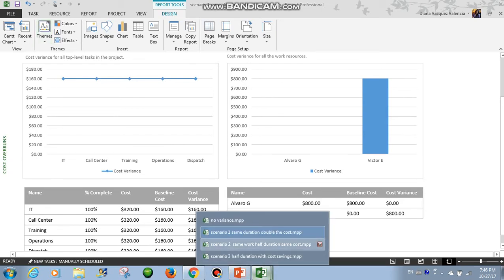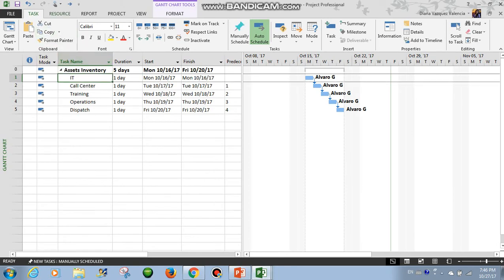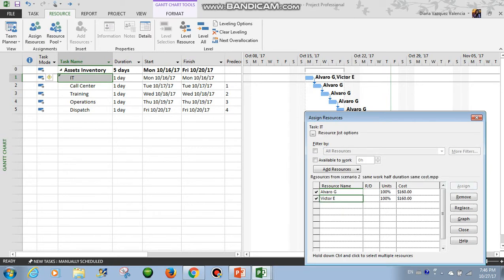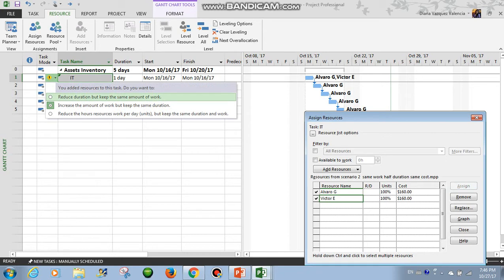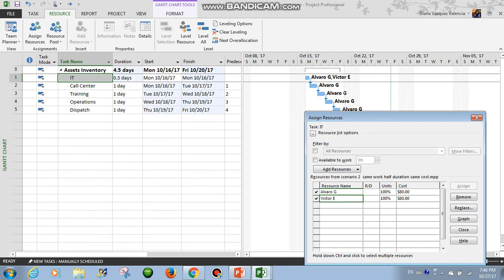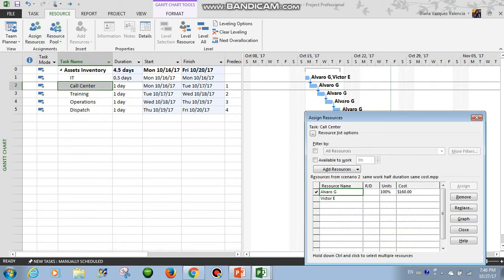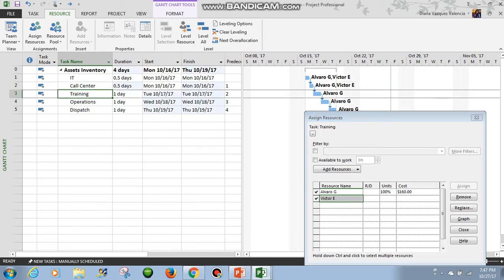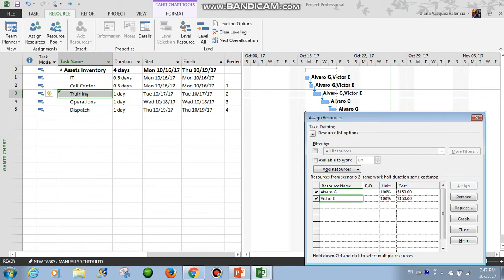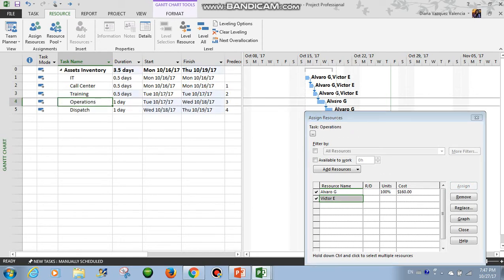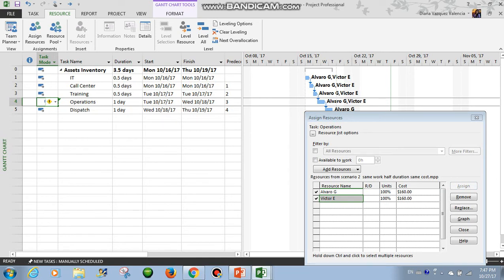Now let's look at the second scenario. Let's assign here Victor, and choose the first option: reduce duration but keep the same amount of work. As we see here, the duration now is half a day. This means that the task is the same complexity that we thought. So if we put two people to work, they can complete the task in half the time. So instead of finishing by Friday, they will finish by Wednesday — they are doing the work faster.